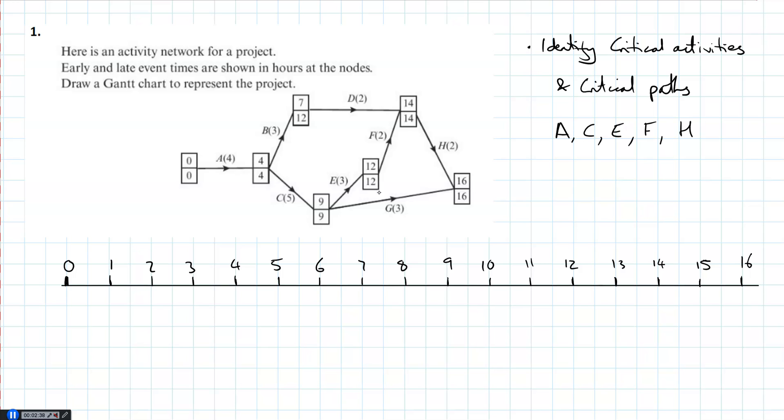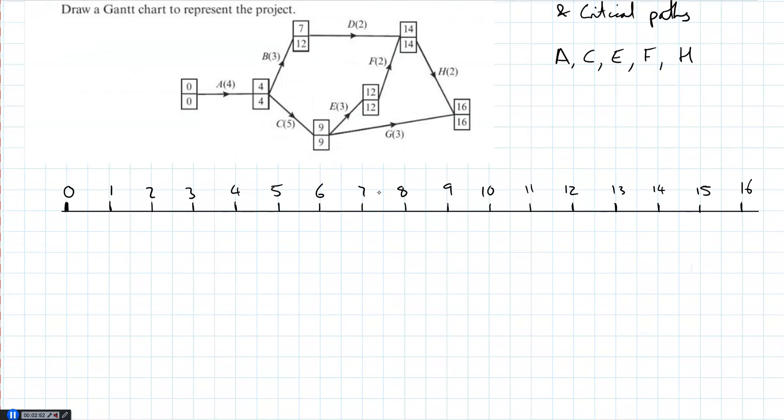So they're my critical activities. And that is actually a critical path: A, C, E, F, H. That's the only critical path in this network. So we're going to put that on first. Critical paths get their own line on our diagram.